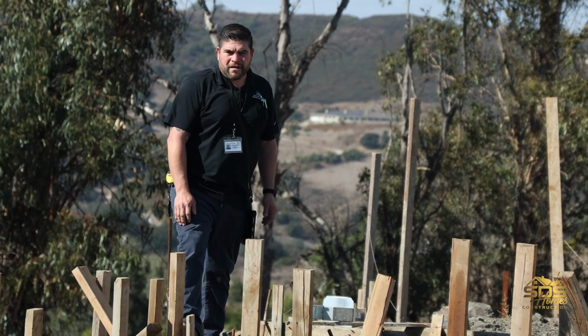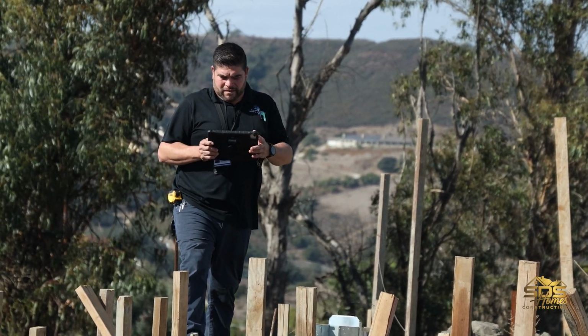Right? So final inspections, as we've talked about before, is your final walkthrough and inspections with the county of them giving you, yes, you can move in. You can occupy your residence. But sometimes there are fixes in that. So know there could be a week or maybe 2, which is the longest I think we've had as a delay. But just know there could be a time where you're delayed a little bit. And those fixes may cost money.